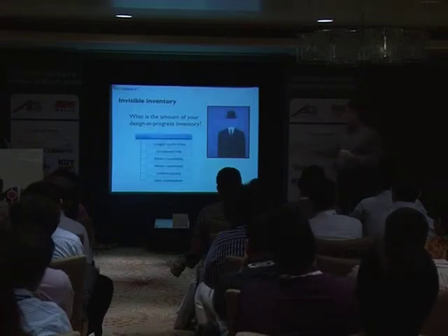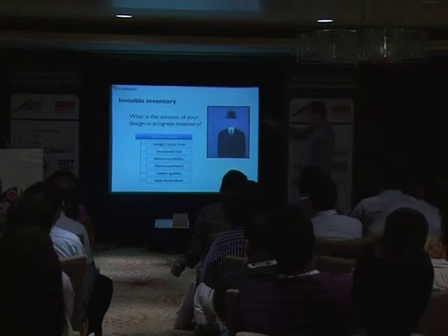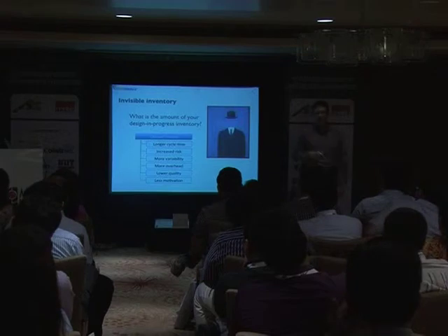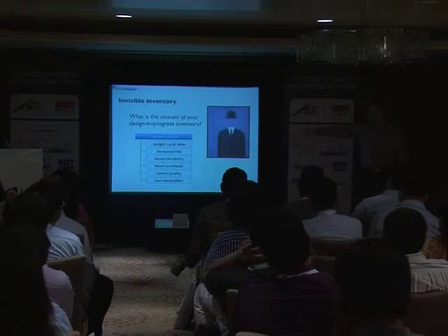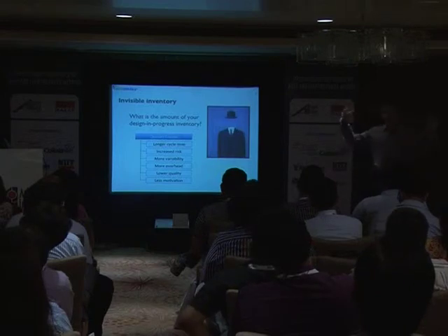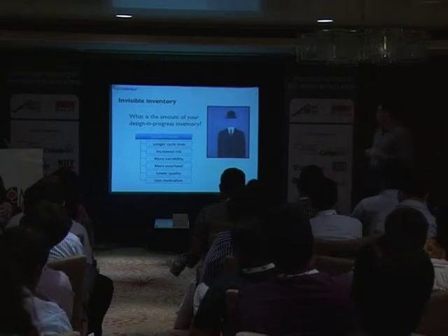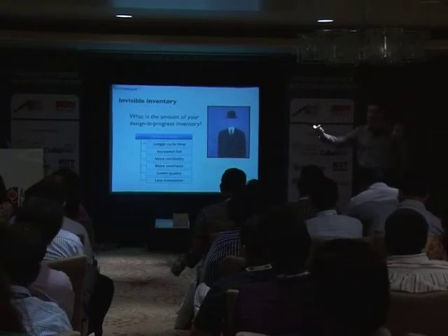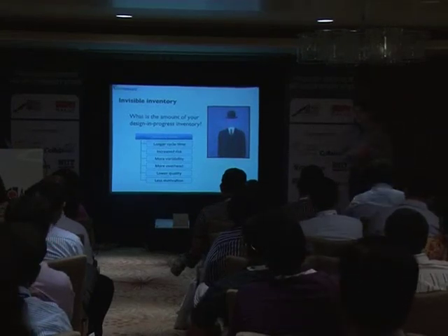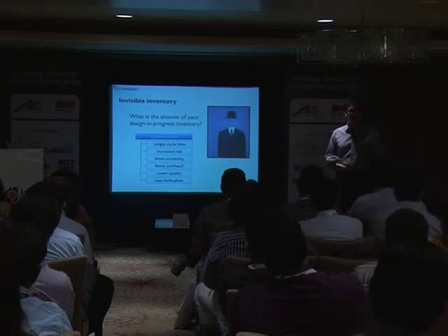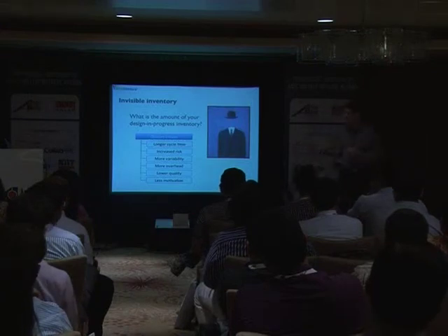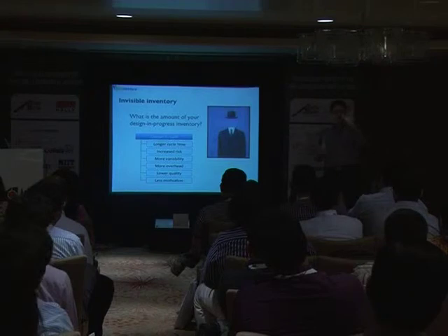Okay? So what that means is that we have to understand there are aspects to consider when we're talking about queues. So what happens? Well, depending on the size of our queue, we can run into this. If our queue increases, then we have a longer cycle time, which means it takes longer to finish the work. We increase the risk, obviously, because the larger the amount of work that we have to work on, there is more to consider. And then risk accumulates. There is more variability. Something inside that amount of work has some sort of issue, or there's a variation.